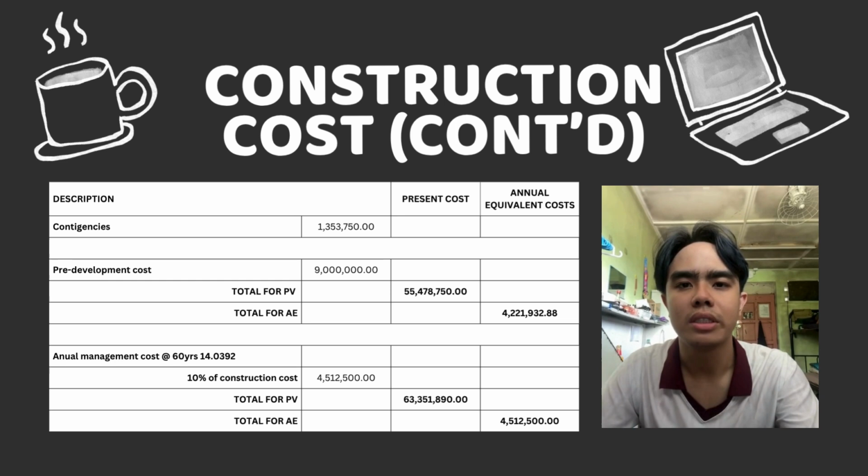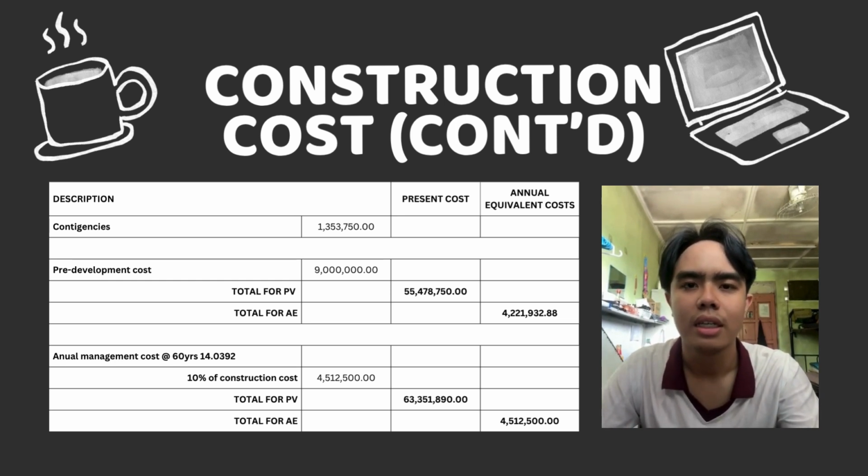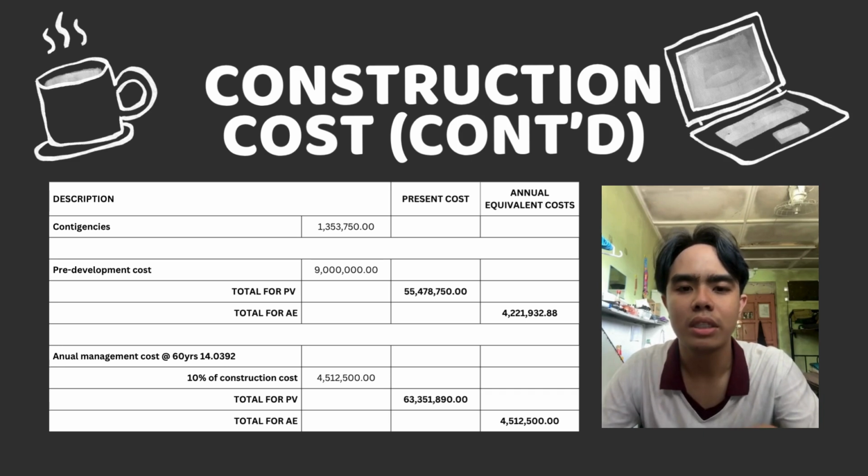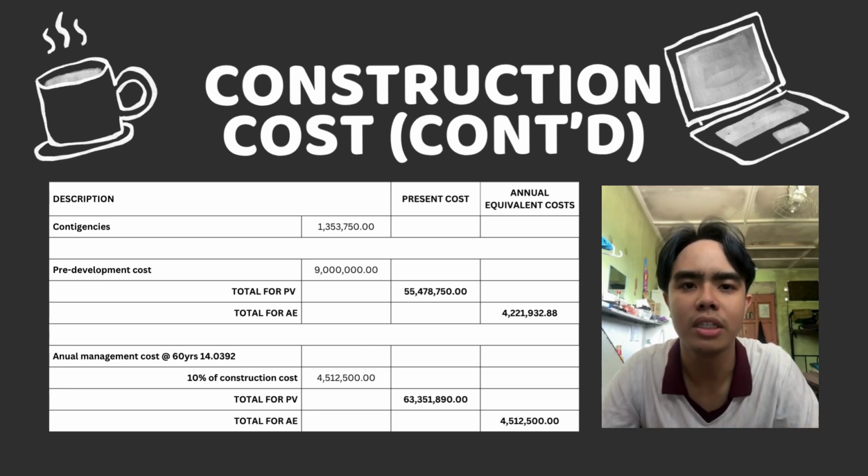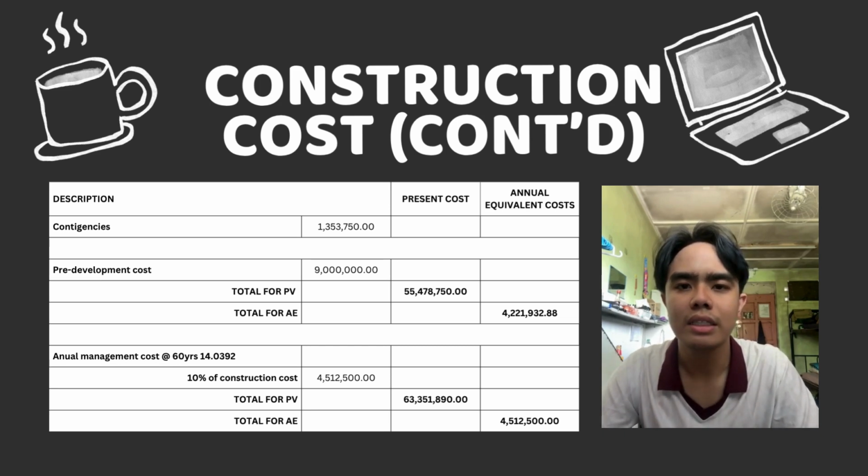Based on this question, the contingency rate is around 3%. This percentage is applied to the total construction related costs, which include building construction costs, infrastructure costs, and the preliminaries. The total of these three elements is around 45 million ringgit, and after multiplying it by 3%, the contingencies cost is around 1.3 million ringgit. This amount is then added to the total project cost.